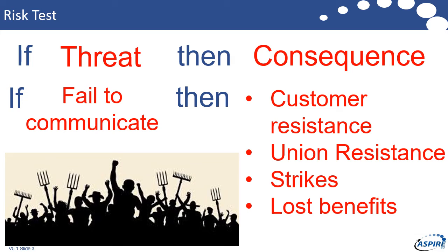And by focusing on the threat and then looking at the consequences of that threat, I was able to reduce my risk register from something like 40 odd lines of risk down to about 10. And it is the reality that if you're actually in a program, there are probably about 10 real threats that you're going to face. For example, resource shortages is another common one that you'll face. So getting that idea in your head, if then gives you the threat and the consequences.